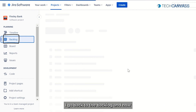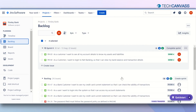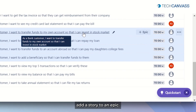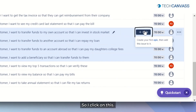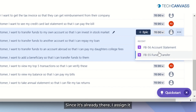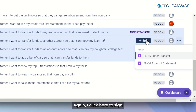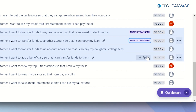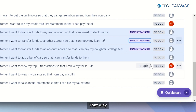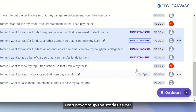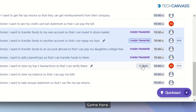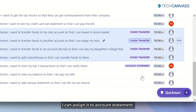Going back to the backlog, I can now show you how to add a story to an epic. I click on this story and assign it to Funds Transfer. Again I click here and assign it to Funds Transfer. That way I can group the stories as per the structure of the requirements into epics. Similarly, I can assign another story to Account Statement.